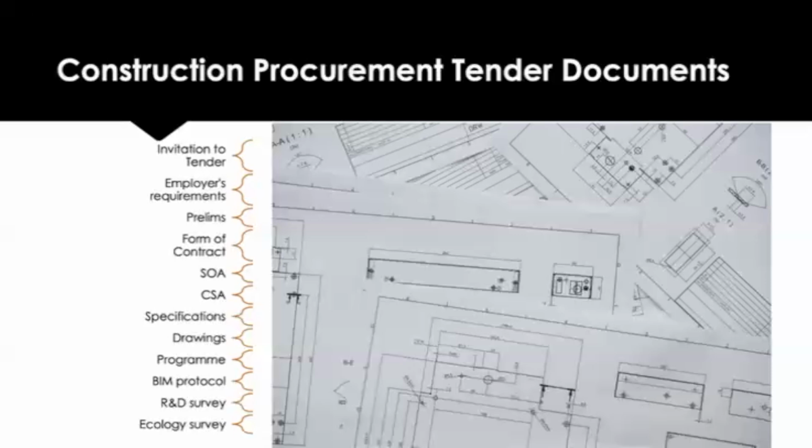And it will also enable the cost consultant to assess whether or not value lies within different tenders, like the foundations or the finishes or something like that. This is a good document to identify problems or differences, maybe something that's been incorrectly interpreted. It might identify areas where you might be able to get a saving, but ultimately it forms the financial basis of the contract.